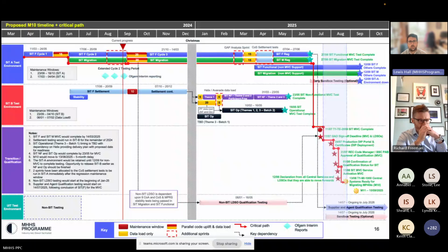So the underlying assumption at the moment is that 7 weeks is sufficient. We have been identifying candidate tests to feed into regression again. So whilst we haven't formalised that scope, we do have a set of candidate tests that have been able to feed into that analysis. There's a certain level of risk there, and we do need to agree, and we've been talking about this as a team, what the scope of regression is to ensure that the 7 weeks is sufficient and make that work. So we have been monitoring it, we have been assessing it, but we haven't yet finalised what that scope is, but we do have a set of regression candidate tests.